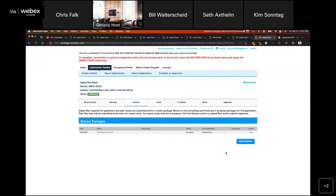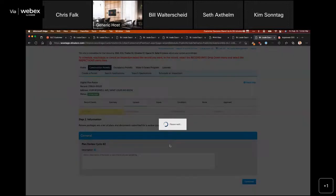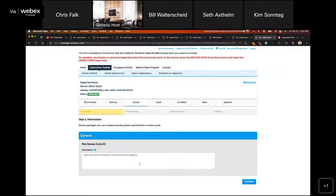Previously, we didn't have the capability as customers to open up a new review package. It happened when the new application was submitted. It happened when a cycle of plan review was completed. But for our purposes here, once a permit's issued, if we do have to submit an addendum, we'll go ahead and click the new revision button. And that's going to launch a new review package.